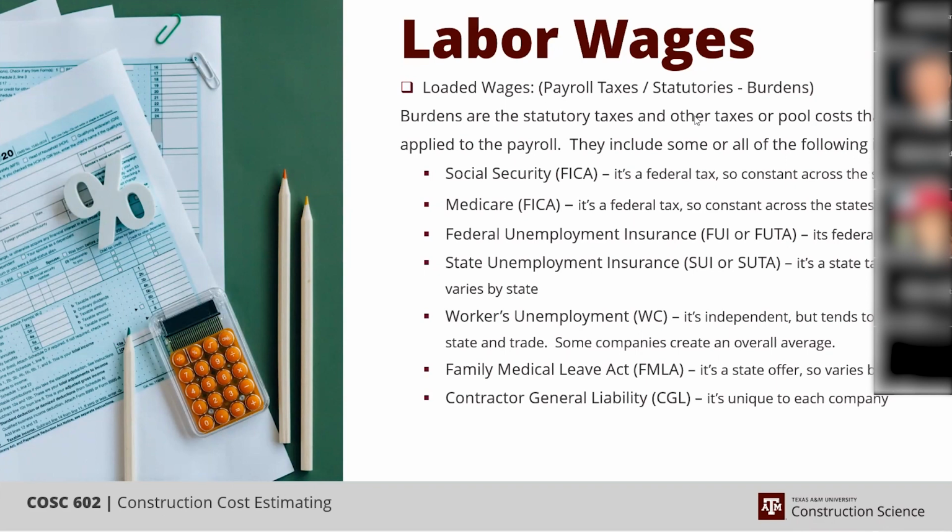Some companies don't include this. The company I work for currently does not include CGL in the wage rate. They apply insurance at the project level, and basically it's an all risk insurance, covers everything. At some of the other companies I worked for, we included CGL in the wage rate, and it covered basic things, kind of like your car insurance does for each one of us personally.